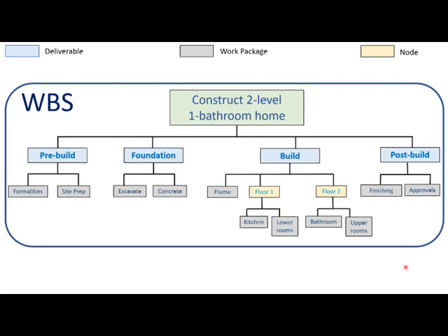A note of caution: the term WBS is often used, somewhat loosely speaking, to refer to even a very detailed depiction of work, far more granular than the work packages. Conceptually speaking, this is incorrect. And remember that if you're planning on taking the PMP certification exam. Using the term WBS to refer to all the gory details of work is more of a colloquial and roughly right use of the term WBS.